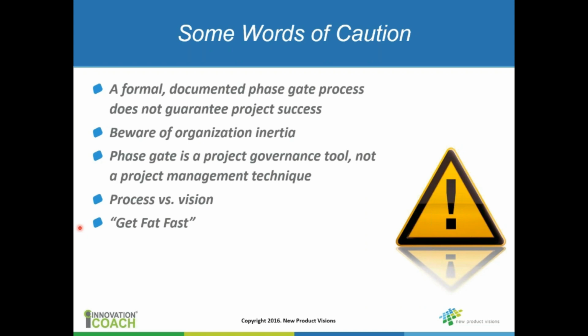Typically at the back end, what happens is the project is late. Senior management typically wants to put a lot of resources in the project at a time when it really is not going to help get the product to market any faster. Actually, it can hurt more than it can help.